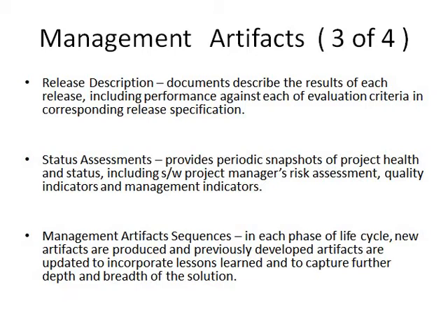Okay, so generally your normal status assessment, what should it include? Your review of resources, your personnel, your finances, where you go for your cost and expenditure, your risks, progress, and the other checkpoints which you call your milestones, whether achieved or not, that is your results, and your entire follow-through.